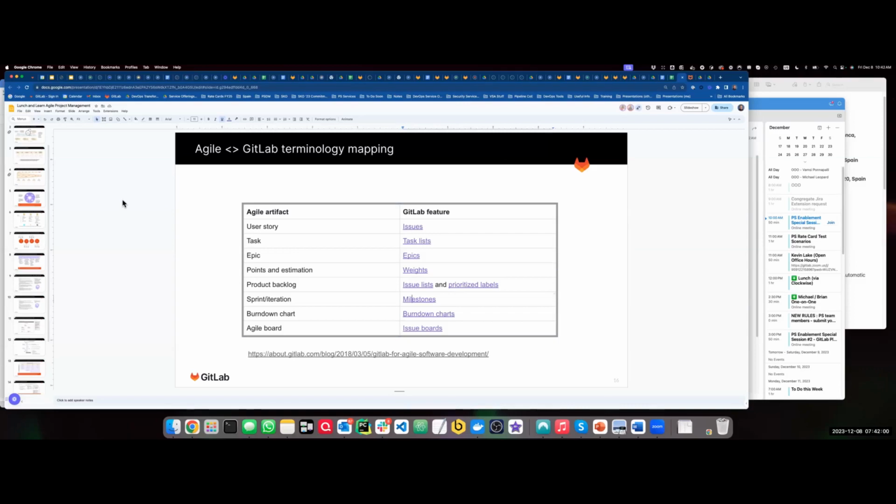More specifically, milestones are used to group issues and merge requests together based on a common goal, deadline, or event. So they are in a broader scope compared to iterations, and they can encompass longer periods. That could be the slight difference between milestones and iterations, but they serve slightly different purposes.